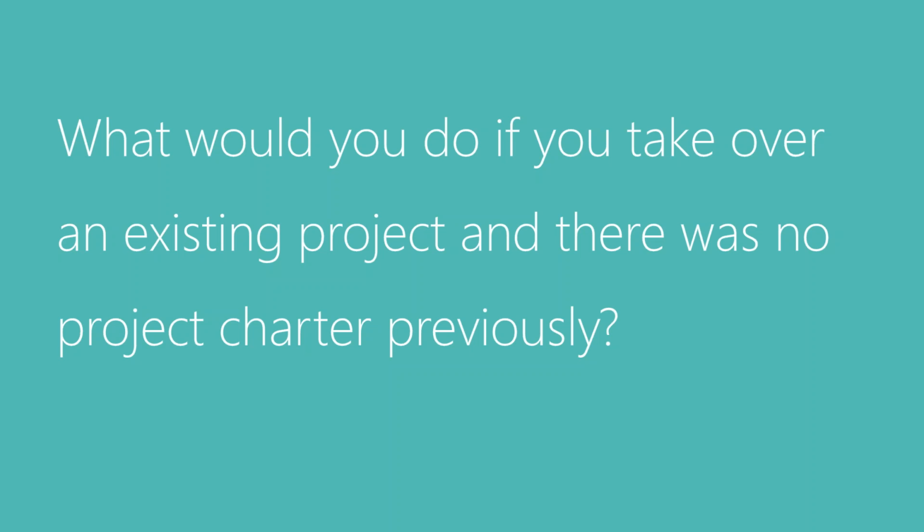To be honest, we don't always have business analysts on our projects. I don't know your experience, but many times as project managers, we sometimes end up creating a charter for our stakeholders. And for me personally, if I don't have a BA, I will create one because it helps document the discussion, and also is a document that we can use during our project team meetings to go over and verify the different components. Are these still valid? Because I like to say that the project charter or any of our documentation is not one and done. We always want to make sure that we're reviewing our documentation, our understandings, and testing our assumptions, looking at our risks, and all those good things that make up a charter.